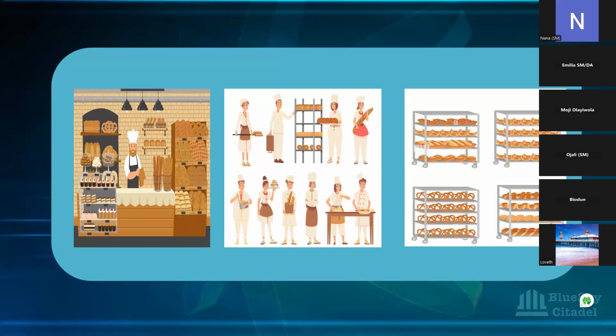Those are parts of how you support the product owner. You'll have prepared the product owner that whatever you're planning for this sprint, this is the availability, especially during, let's say, summer time, when a lot of staff go on holiday, especially the ones with little children. You have fewer people working. So you need to prepare the product owner: remember, this is the summer period, a lot of people go on holiday.